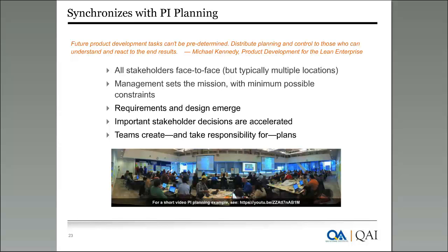Once the agile release train starts working on a big program, a 3 months program where multiple 5 to 10 agile teams are working, the first thing they do is program increment planning. This is like sprint planning. When you start a sprint in Scrum, you do a sprint planning. Like that, there will be program increment planning.